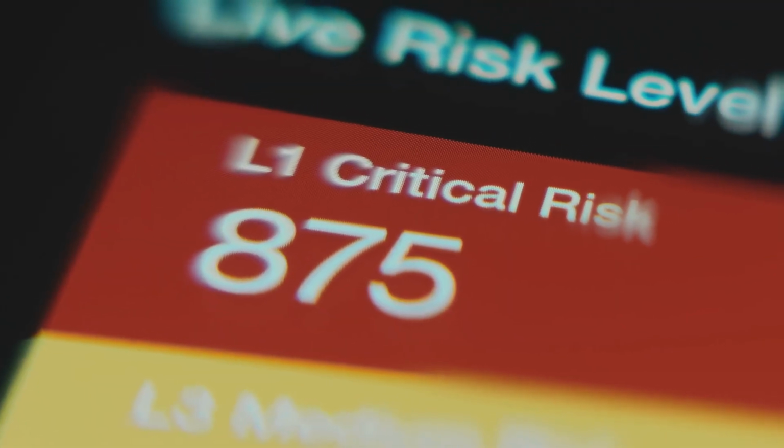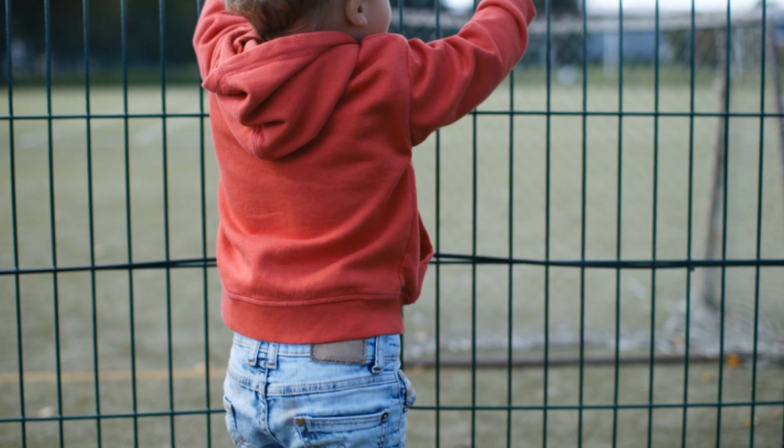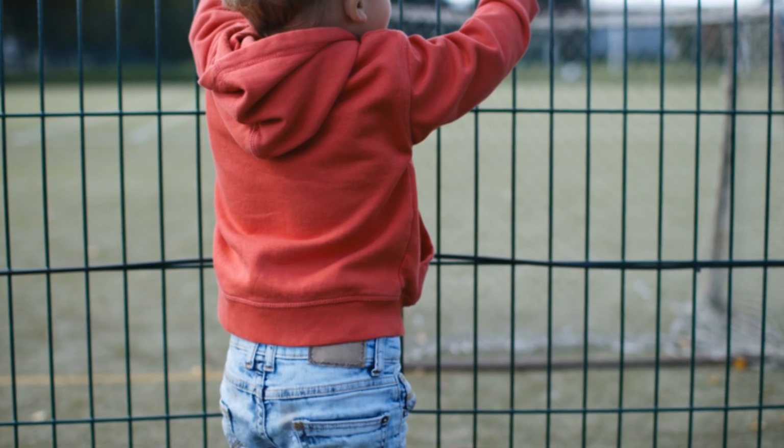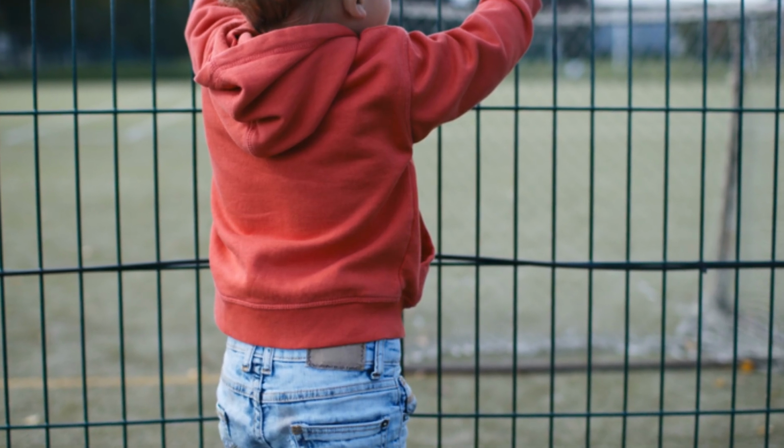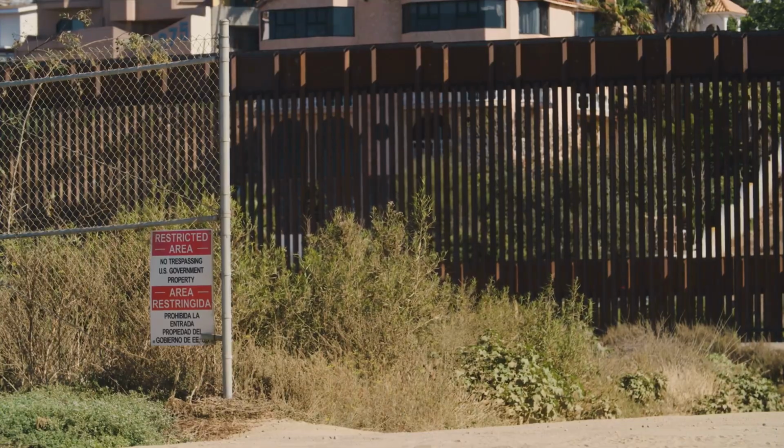First, write risks as cause-event-effect, not animals. Example: gap under hedge allows coyote entry, leading to child injury and liability. Second, score likelihood and impact, and add velocity, how fast it hits.